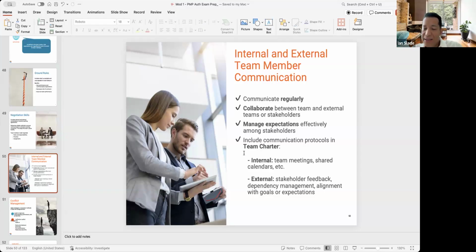They're all on this link. So what the other person has to do is go into your SharePoint link and pull information out, right? So you notifying them is push, them going to the link and getting information is them pulling it. So that's the difference between push and pull.